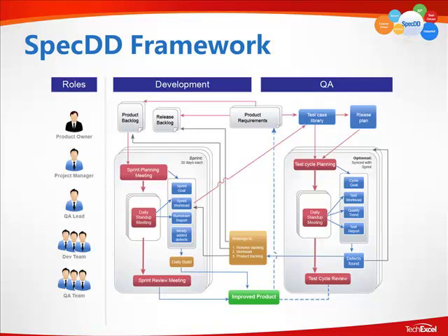The QA floater, first and foremost, resides within the sprint, within the development team, to help them instantly test certain features or functions right as the developer is writing the code. That's the most important function of the QA floater. The QA floater may increase the time remaining because of the QA subtasks, which are the items that test the original development task. And if they do find something, then right away it increases the time remaining because the developer has to go back and fix it.